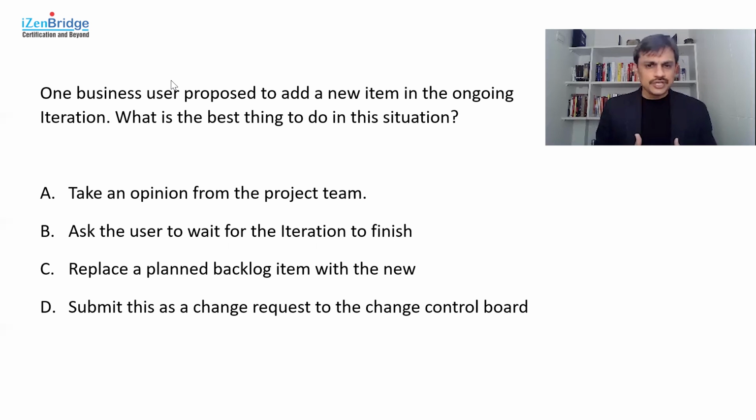Submit this as a change request to a change control board also seems inappropriate, because in the agile world, we do expect lots of requirement related changes. And in most cases, requirement related changes will not go into a change control process. Rather, they will go into a backlog refinement process. So that's the appropriate place for the change to be discussed. There could be change management in the agile world as well. You can have some kinds of changes which require change control board intervention, and you can define it in your overall project management plan. But for requirements, you are not expected to go to a change control board. Backlog refinement is your change control board for that. That's how you can think of it.